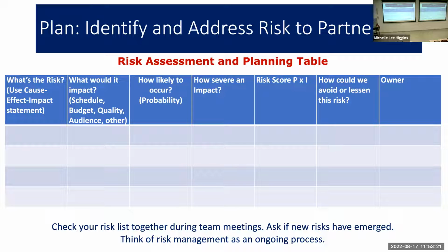There's also the last column, which is the owner. Who is in charge of keeping an eye on this? Who's in charge of tracking it, monitoring it, documenting, all of that, right? Each risk has an owner. And so think of risk management as an ongoing process.